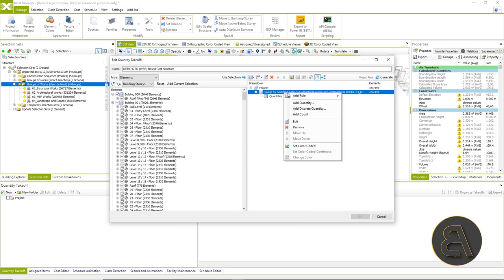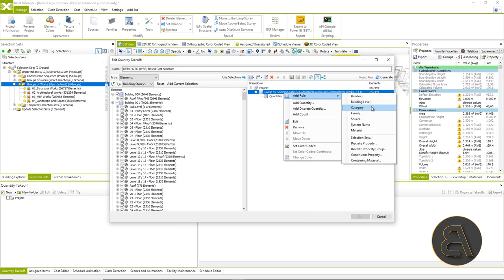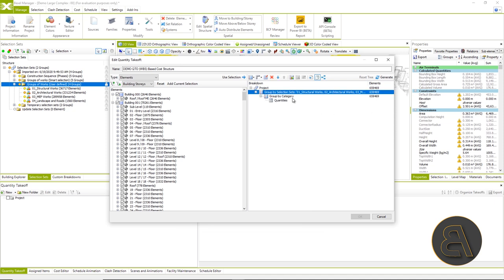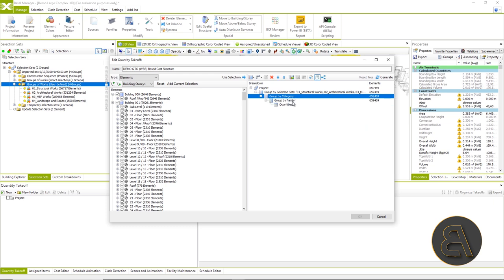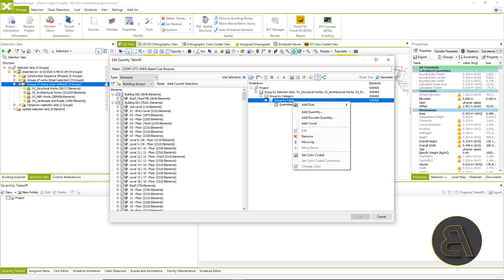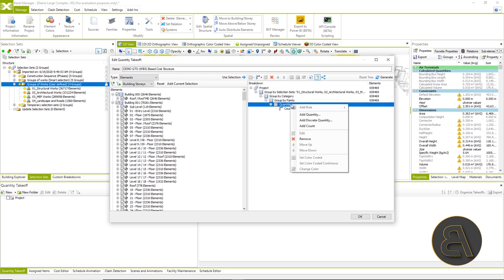And then the next step in the structure would be the division by categories and the last by families from the model. Finally, we will add the quantity or count and later for certain types with multiple selection, fine tune in which unit and in which formula we want the certain positions to be in our budget structure.